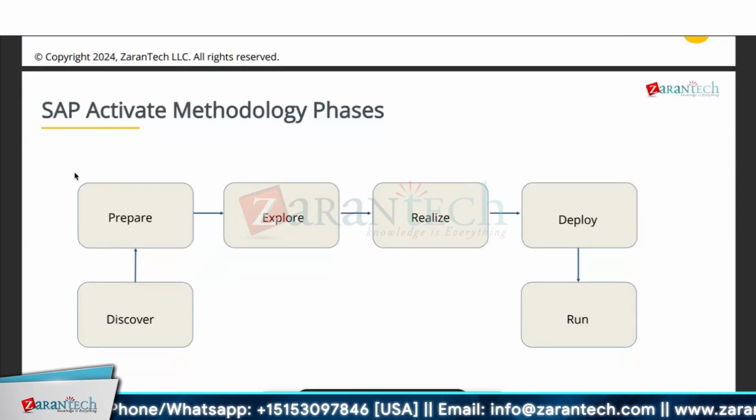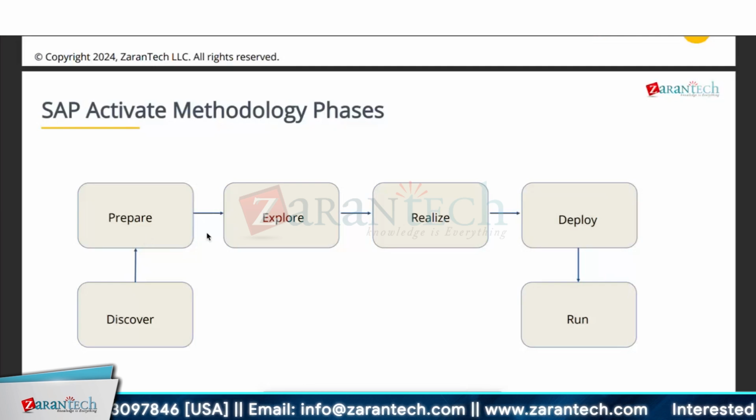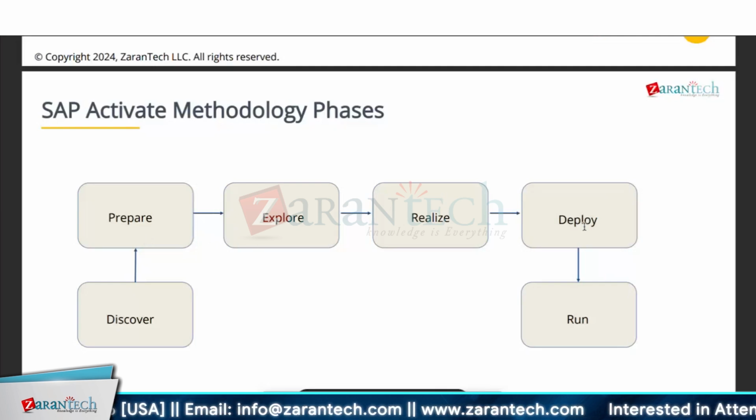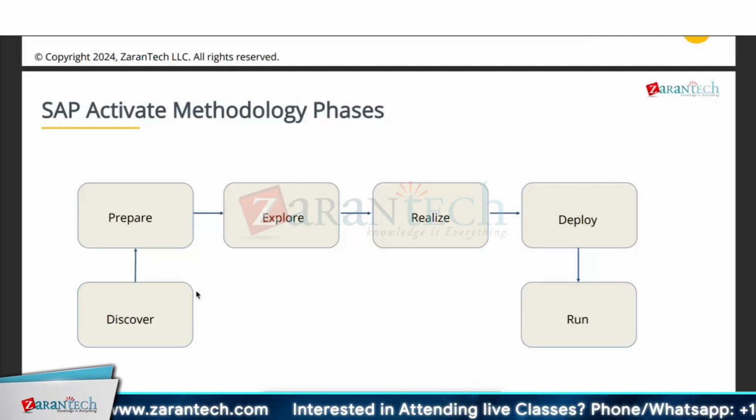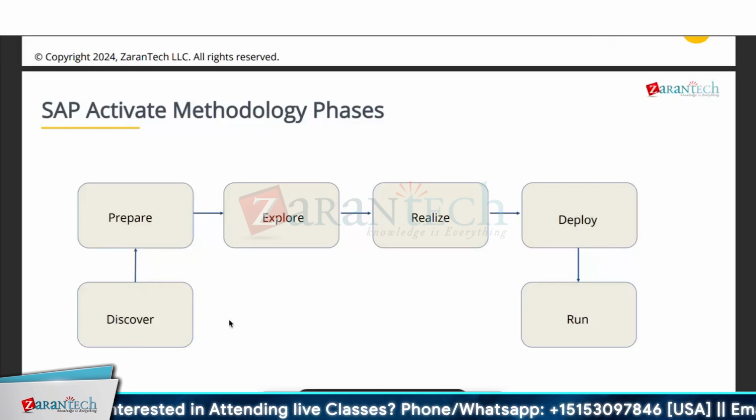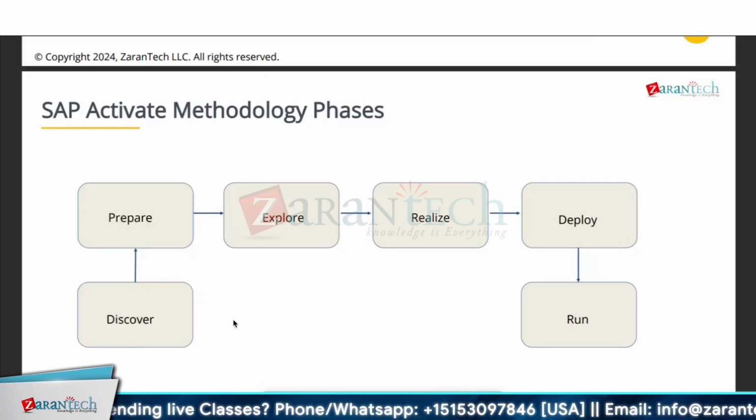So this is one such methodology's phases. Generally we use the Activate methodology phases, like right from prepare to explore, to realize, to deploy, and then we'll run it, right? Before prepare, we'll discover also, right? So the same things are there everywhere in S4 HANA Finance, but with a little more addition. Addition means it's not like we will be tweaking that, okay? So here in the discover phase, in the preparation phase, we will generally go with the project planning and scoping, okay? In any S4 HANA Cloud Finance,